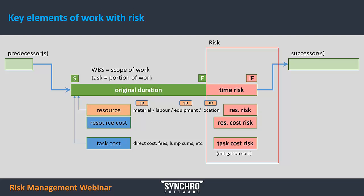Some people might argue that this belongs to the risk manager and it's his responsibility, but I think this should be a project team effort, and that also includes planners and everybody really. So the next question is: what do we do to make it part of our schedule? First of all, we have to follow certain steps. Step one will be to identify the risk. Step two is to assign the risk to the relevant task. Step three will be to assess the risk. Identification and assigning risk is relatively easy — this is done by creating a list of potential risks and simply linking those with appropriate tasks. But what is difficult is the assessment part.